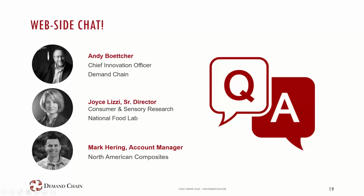We spent a lot of time, I think, in planning and in sandbox phases before we went live, because the go live had to be error-free. Now, of course, it wasn't going to be error-free, but it had to function. We couldn't afford some downtime. I think we blocked, maybe gave DemandChain like 3 days where we didn't schedule a test over a 3-day period. But it was really more about, for us, a lot of planning, allowing time for planning and testing before we launched.